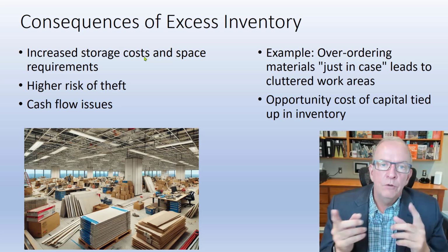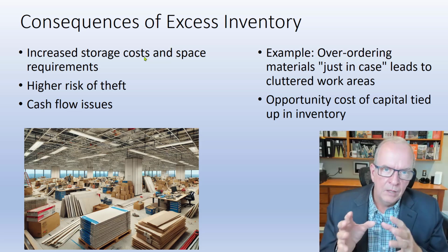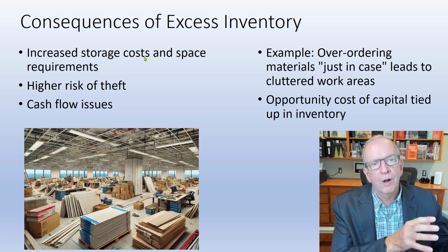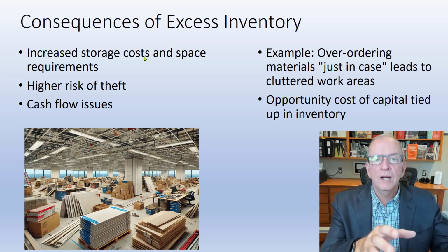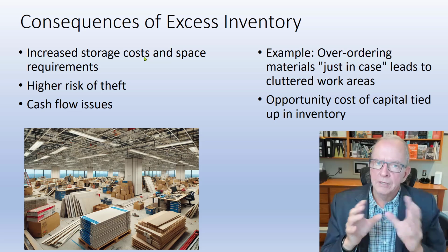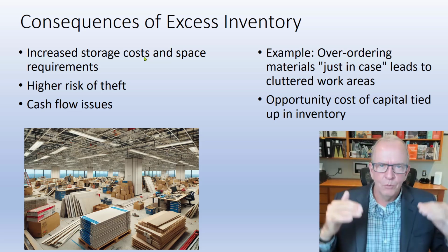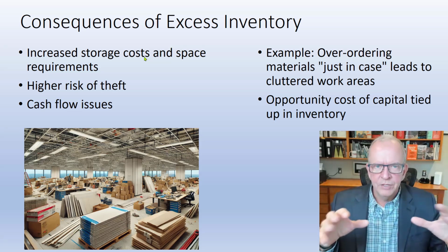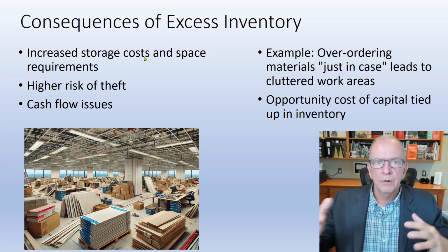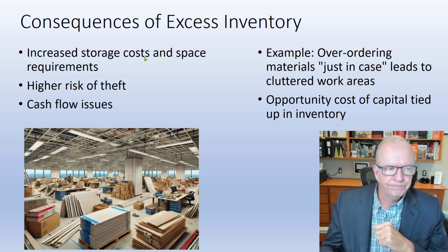And of course, if you've tied up that money from a business perspective, your limited capital, that might restrict your ability to conduct other projects because your capital is all tied up here. So that's a big one too from a business perspective. There are different layers we have to think about. We have to think about the project direct costs. We also have to think about the business overall, which is operating a number of projects at the same time and has overhead that it has to work with.